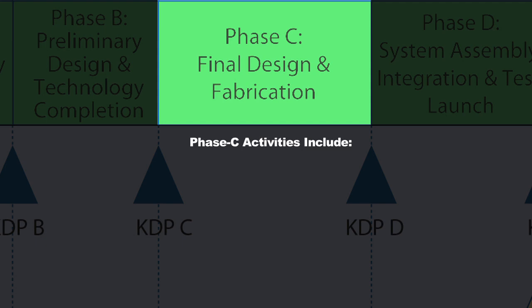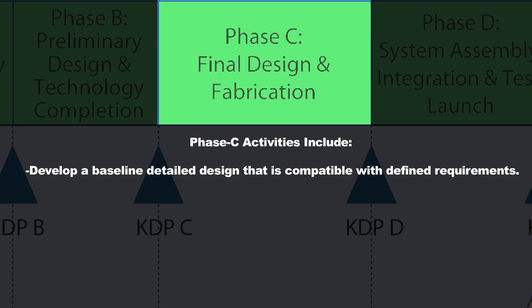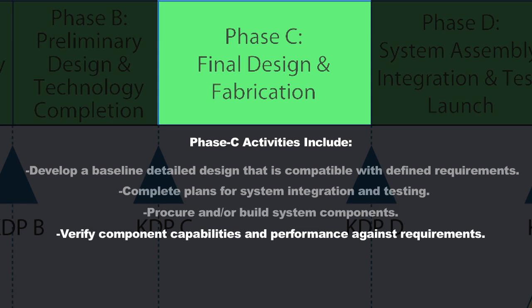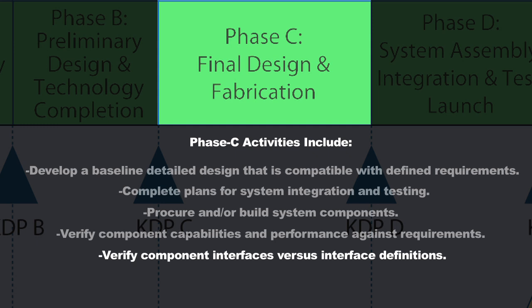Phase C activities include developing a baseline detailed design that's compatible with all requirements down to the lowest level defined in earlier periods. Completing plans for system integration and testing — this is where you'll actually put the system together and test it at a full system level — with all plans laid out in Phase C. Procuring or building all system components, verifying the capability and performance of each component against its requirements, and looking at component interfaces to make sure they're all clearly being met.